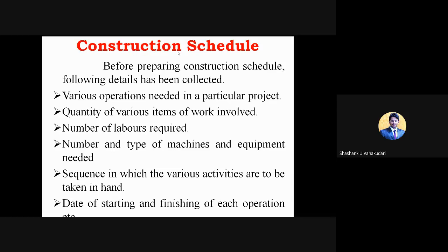So that one can be put according to this construction schedule. Okay, and the number and type of machines and equipment needed, because this construction schedule duration is purely dependent upon the other resources. A certain work which is going to be completed with 10 labors in 2 days, if we increase the number of labors to 20, that can be done in 1 day also, right? So depending upon the availability of the resources, this construction schedule can be prepared.